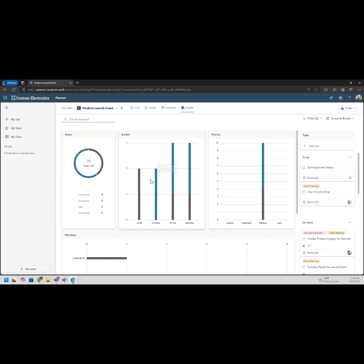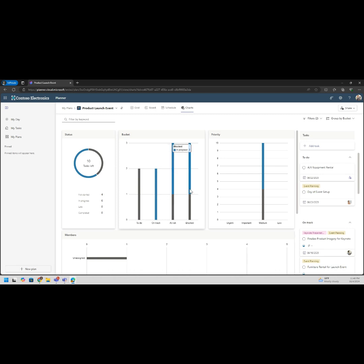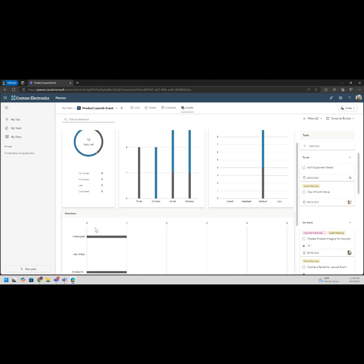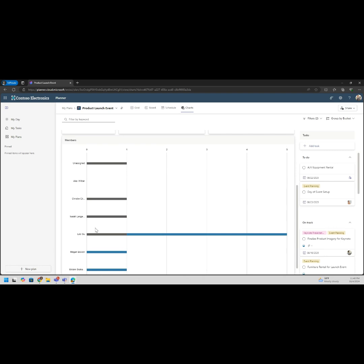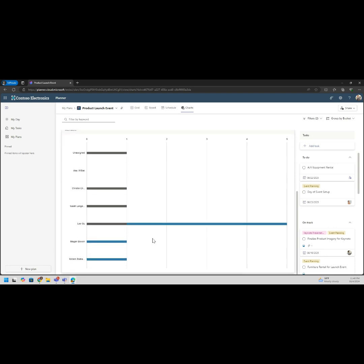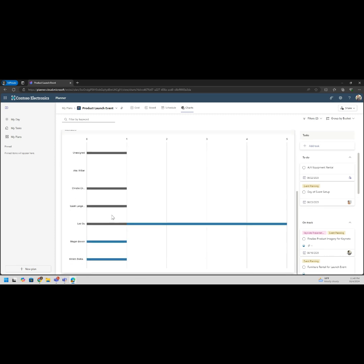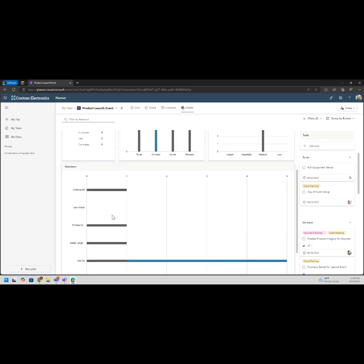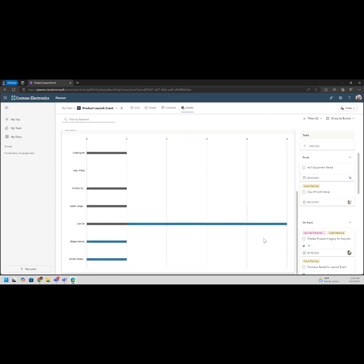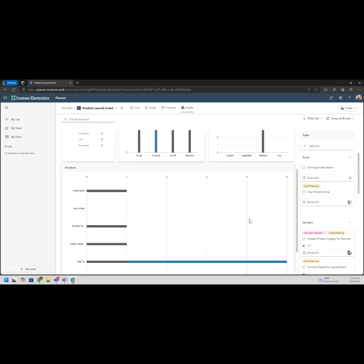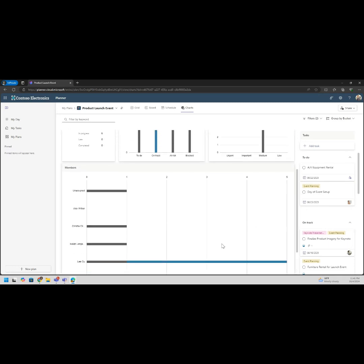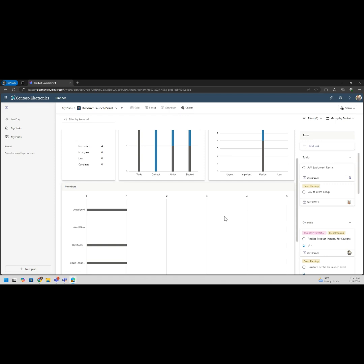We can go to the organization and say how many of our tasks are at risk. We have two in progress tasks at risk, we have one that's not even started yet. How many are blocked? Two in progress and one that's not started yet. So quickly we can just see we have 10 tasks left, four not started, six are in progress, nothing late yet. We can also see unassigned. You can see who is assigned to stuff. Some project pieces are unassigned, we have some team members that don't have anything assigned, and we have some that have five or more. That's a lot for one person. We can start to decentralize our workload a little bit more, make sure our workload is well dispersed and we're not burning anybody on the team out.